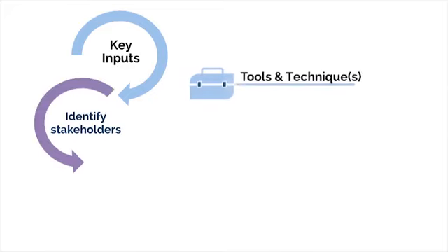The key tool and technique here is stakeholder analysis, in which we systematically gather and analyze quantitative and qualitative information to determine whose interests should be taken into account throughout the project. It's one way to clearly identify who the stakeholders are. You need to identify all of those who have an ability to change your project or change the result of your project. There are three key steps in this process, and they include: 1. Identifying all potential stakeholders and relevant information about them. Once we identify them, we could perhaps interview them to get a list of all potential stakeholders.